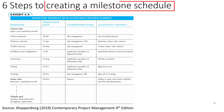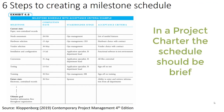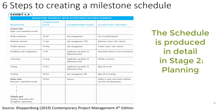This video explains the milestone schedule and acceptance criteria template that can be used in a project charter. All project charters should include a high-level schedule and state the key milestones. This should be brief and not too detailed — enough for the project team and key stakeholders to understand how the project needs to be planned. If the project progresses, this schedule will be expanded and detailed in Stage 2 Planning, usually using software such as Microsoft Project.